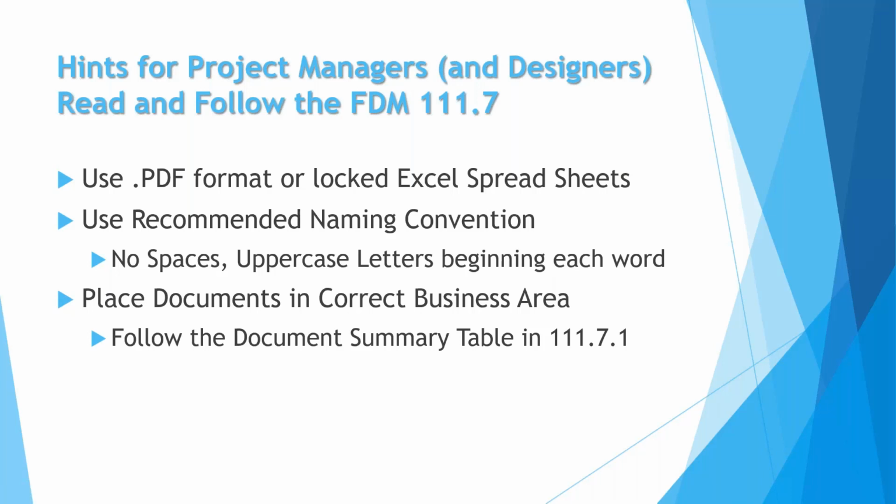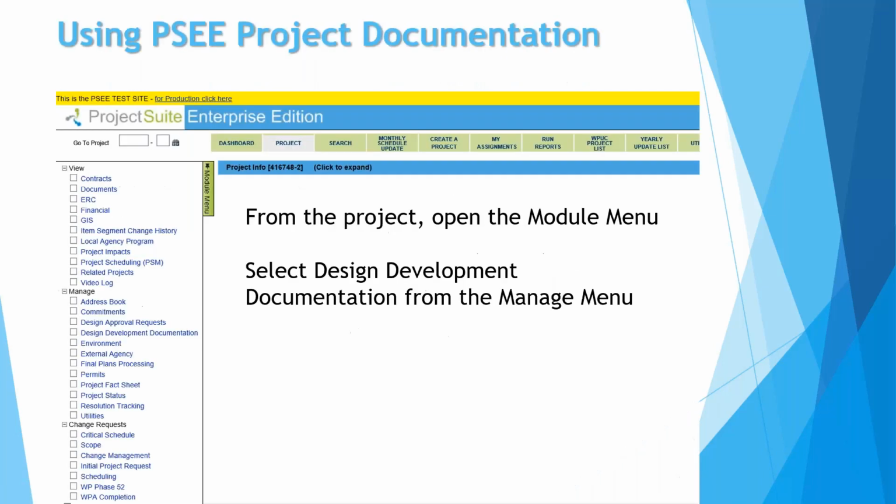Use the recommended naming convention that's in the table 111.7.1. No spaces. You can use upper and lowercase letters to make the file name easy to read. Place documents in the correct business area. And again, follow that summary table in 111.7.1.